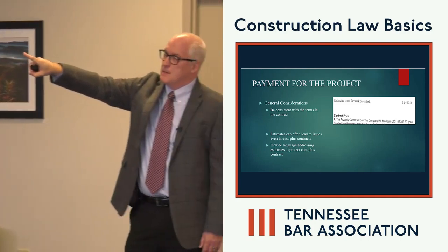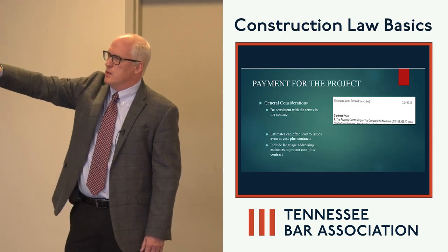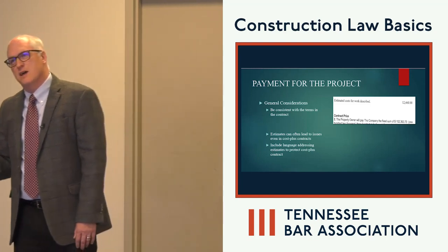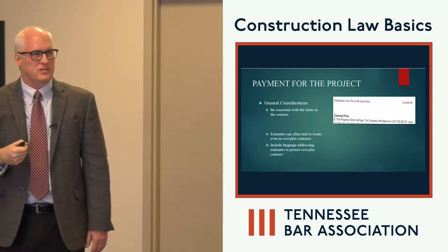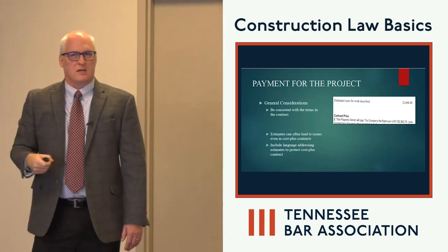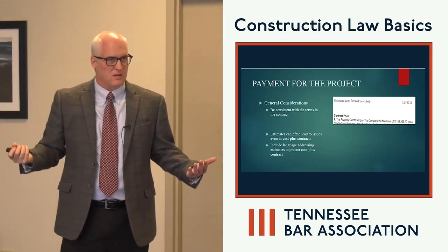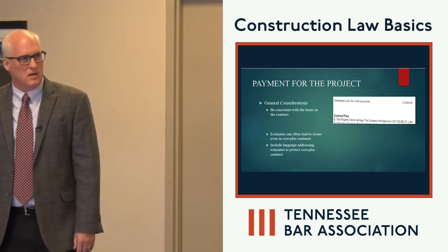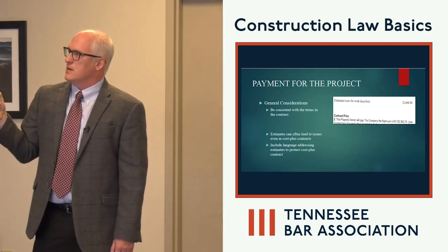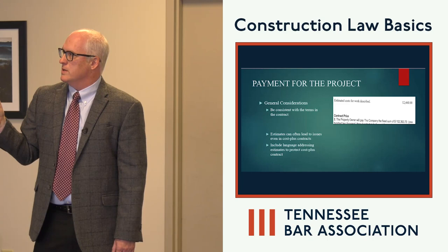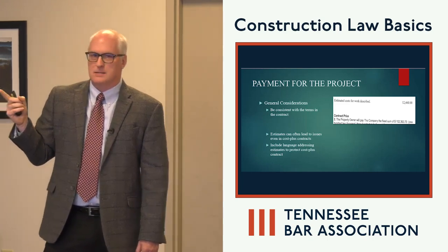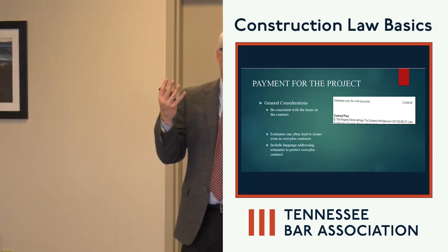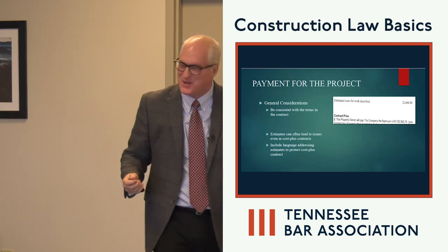In this particular case, they did amend it. The job went up to 120, but the project went over to 150. My client asked, how much more work? The contractor said about $10,000 worth more of work. Come to find out, they got popped with a final bill of about $50,000. So a $120,000 contract ended up being a $200,000 job, which my clients are not too terribly excited about at this point. Not excited to pay it, and their blood pressure is elevated for sure. So, good point.